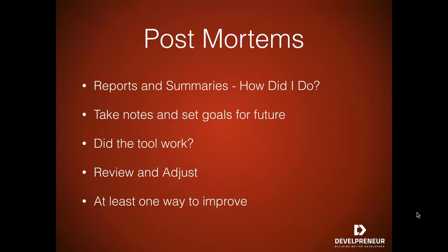Spend a little time and take some notes and set some goals for the future. Look at what you did right and what you did wrong, and try to get some output of that to help you be better. No matter how many projects you've done, I just about guarantee you will always have something that comes out of a project that you can learn from, so that you can be better. So take a look at that, spend some time, and then set a couple of little personal goals or notes, so that you avoid some of the pitfalls that you've made in the past, or that you can focus on to become better.